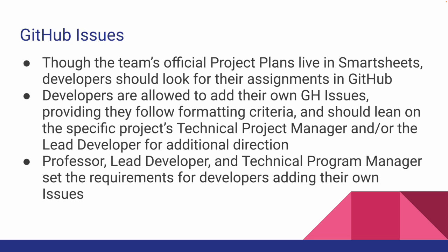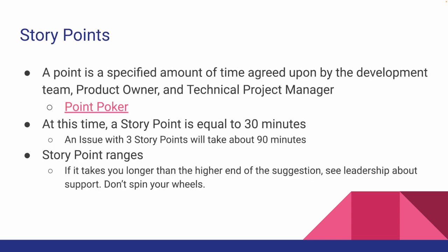And of course, the professor, BC, the lead developer, and technical program manager set the requirements for developers adding their own issues. Now, part of the issues are story points. You'll find this in the issue template. They will prompt you for them. So, a point is a specified amount of time agreed upon by the development team, product owner, and technical project manager.